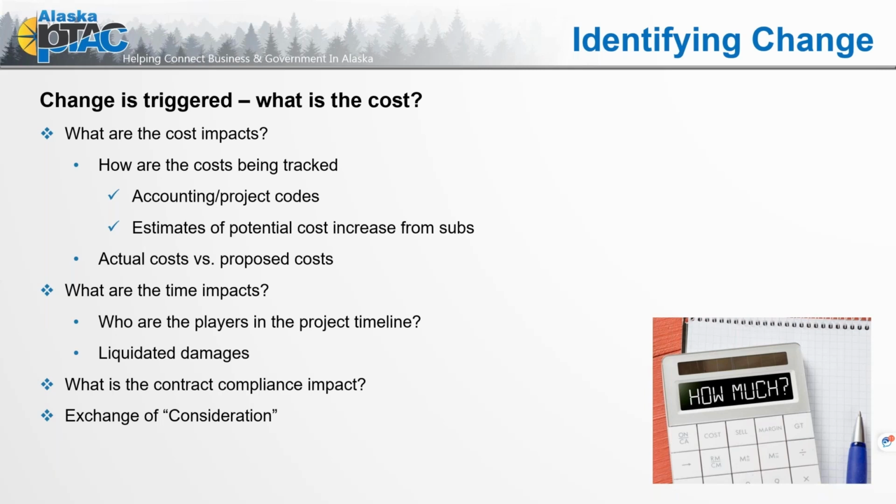If you had contingency costs built in for additional materials, they're going to look at whether this potential change fits reasonably with what you've already built into the cost for that contingency area. Again, thinking construction, if you have those types of contingency costs built in. So they may ask to see those proposal working papers.